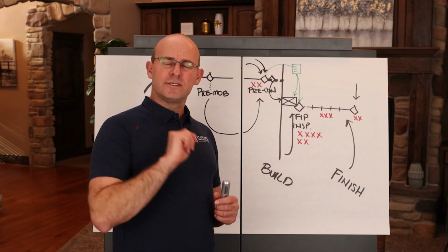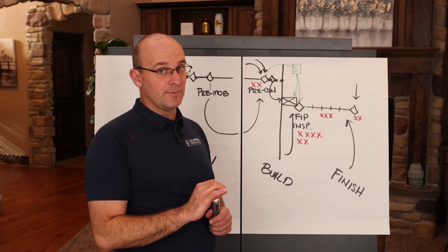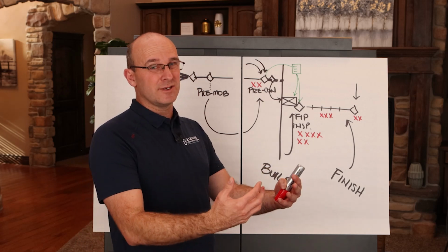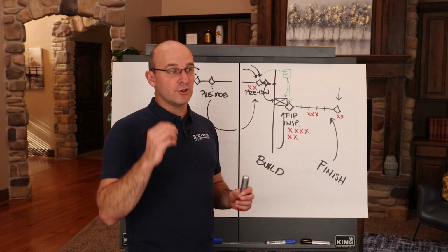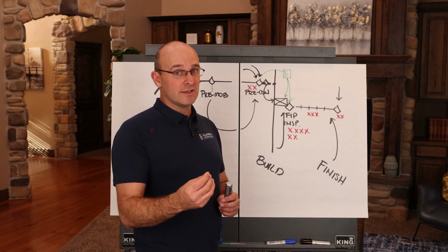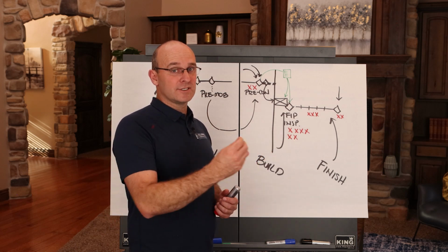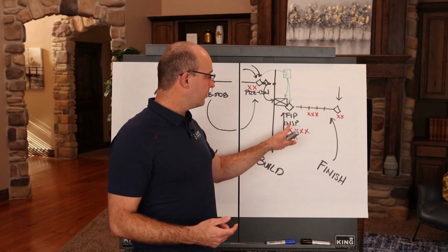And number 8, and this is not insulting, tedious work completions. Rework can happen when crews really start to get into a consistent rhythm, and it's not laziness, but it's familiarity, meaning your brain starts to autopilot a lot of things, our attention starts to drift a little bit, and because it's repetitious, we can fall away from some of our original quality standards.